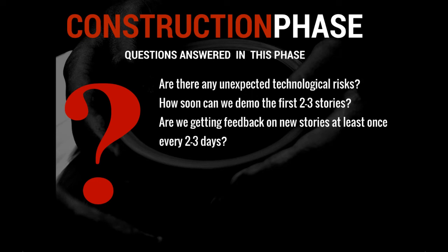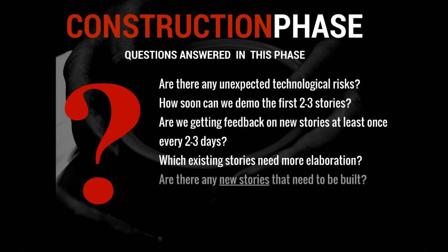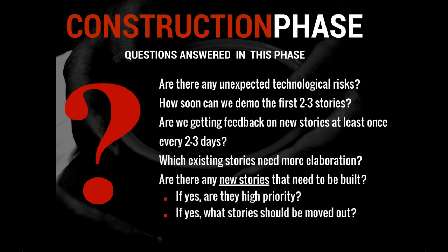As the project progresses, we'll inevitably find that some of the earlier documented stories will need more details. What's more, we'll also discover that new stories may need to be added. This is normal in any software project. The way we react to these changes at Multunus is where the rubber hits the road. While the programmers continue to code on the stories which have enough clarity, the rest of the team works with you, the customer, to make any scope changes to the plan. We like to keep the date of the first release sacrosanct and keep everything else variable. This is the lean startup philosophy where the focus is always on releasing early and getting feedback from the market.